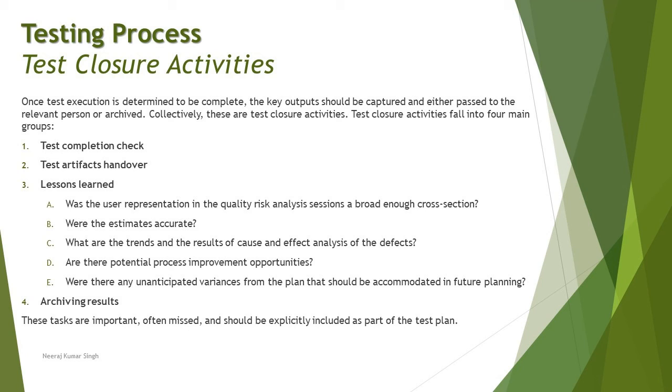Last but not the least, there is another segment which we cover as part of test closure activity, which is archiving the results, logs, reports, and other documentation and work products in the configuration management system. This generally gives you a reference resource to learn from the information you gathered and what exactly you did. In case you're creating a copy of that, or the next version of it, this information will definitely help you understand how exactly the architecture was built, what you did, how you can add more value to it, and many other things.